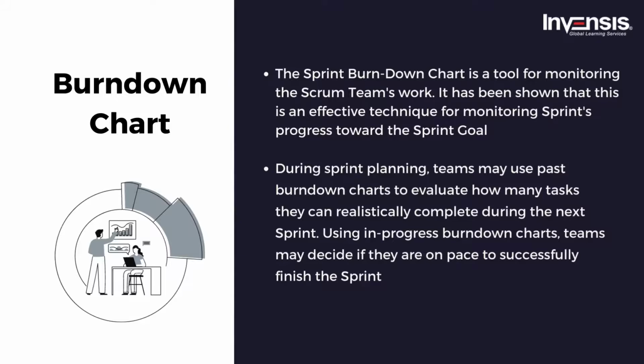At least once during each sprint review, the product owner monitors the remaining work. The product owner compares this amount to the amount of remaining work from previous sprint reviews in terms of increasing progress toward completing the expected work by the deadline. This information will then be shared with all key stakeholders.